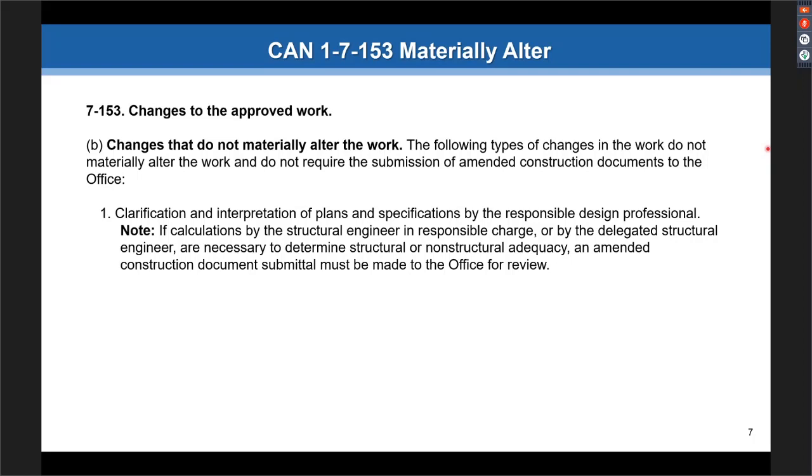Under the note, it states that if calculations by a structural engineer or a delegated structural engineer are necessary to determine the structural, non-structural adequacy, then it becomes material and does need to be submitted as an ACD.